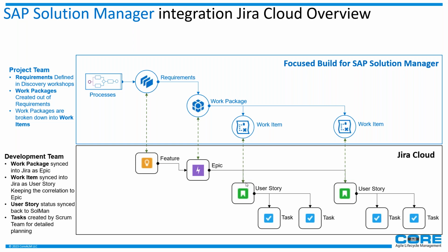will be to deliver the work for SAP and non-SAP. The SAP work will happen in the SAP system, but non-SAP work will happen in Jira, because the team will have their user story assigned to their project in Jira, and they can continue their work. And all the updates will go back to Solution Manager. So the SAP team does the SAP work in Solution Manager with the transport and everything, and the Jira team does the work in Jira related to the user stories that have been assigned to them for non-SAP work, right?